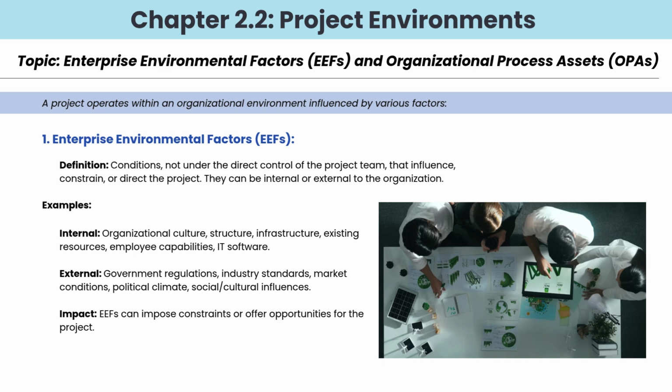Internal examples include organizational culture, structure, infrastructure, resources, employee skills, and IT software. External examples include government laws, industry regulations, market conditions, political situations, and cultural influences. Impact: EEFs can create limitations on how a project is executed or sometimes provide opportunities. For example, access to a new technology or favorable market conditions.